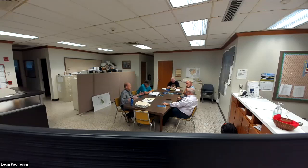What Arosh was talking about was taking all the contingencies and wrapping them up into one owner's bag, all in. That would be Newfield and Allstate, and in my opinion that'd be a problem. I did indicate there might be some reluctance from this group on that. What I would say is when we get 50 or 60% done with the project, then we go for a reduction. Yeah, we hit them for a reduction. Okay, that makes sense.